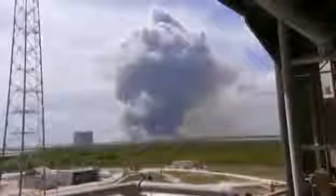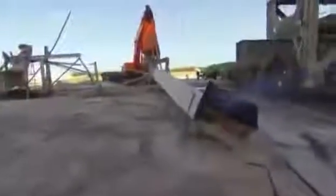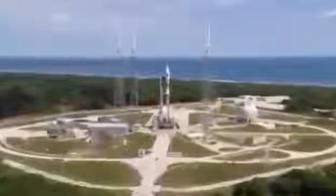It's not just the grasslands that are a concern. The team also have to worry about igniting now vulnerable materials within the tower. Anything that's cut with a torch is a fire hazard and has to be hosed down immediately. And CDI have just 31 days to make sure this giant will fall.